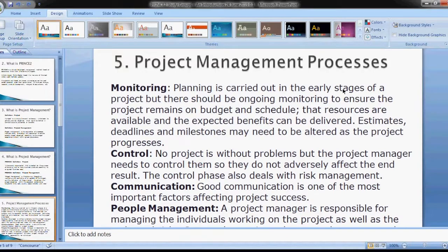So for example, going back to my building of the 10-bedroom mansion, if you're going to start the building, what if the building contractor falls sick, or something happened to him and he could not deliver your product? What happens? It means that you might not be able to start on the 20th of December 2017, which means you might end up incurring more money. You might end up needing to go in for another supplier whose prices might be a bit more expensive. So you need to be able to articulate all these risks before you start your program or your project.